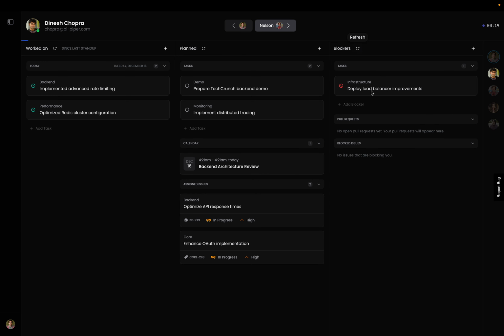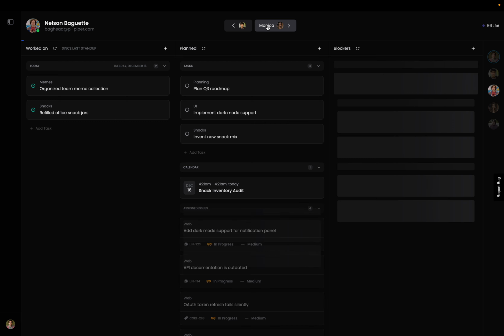Now, let's say Dinesh is this blocker and Nelson can help him out with that. Then what you often see in a stand-up is that people just keep discussing this particular item and the rest is waiting. They waste a lot of time, but it also takes away the focus for people. They stop listening. So what you can now do is just press discuss on Slack. Dinesh will get a Slack ping from the bot. You can set up a meeting or a Slack thread only with the relevant people, and now you can just move on to the next person.